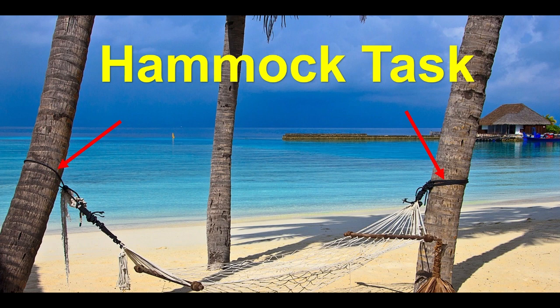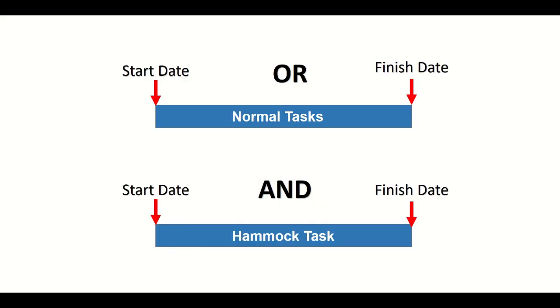Now a hammock task is also of the same kind, where the normal tasks are linked with other tasks at any one particular end, that is start or the finish, but the hammock tasks are linked to other activities with both start and finish.